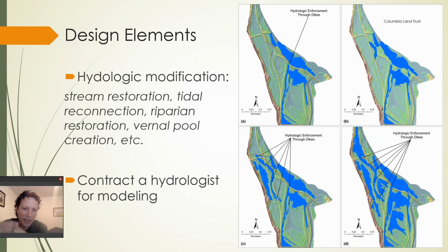This is all going to impact your bottom line as an organization and also your reputation. So the best thing you can do at this stage is do some modeling to make sure that your restoration doesn't have any negative effects to the neighboring landowners or folks downstream. We've definitely seen that happen, and it's a hard thing to watch when a really good project is implemented. It looks to be achieving everything it was set out to achieve, but then the hydrology does something unexpected, and it comes back to haunt that organization.